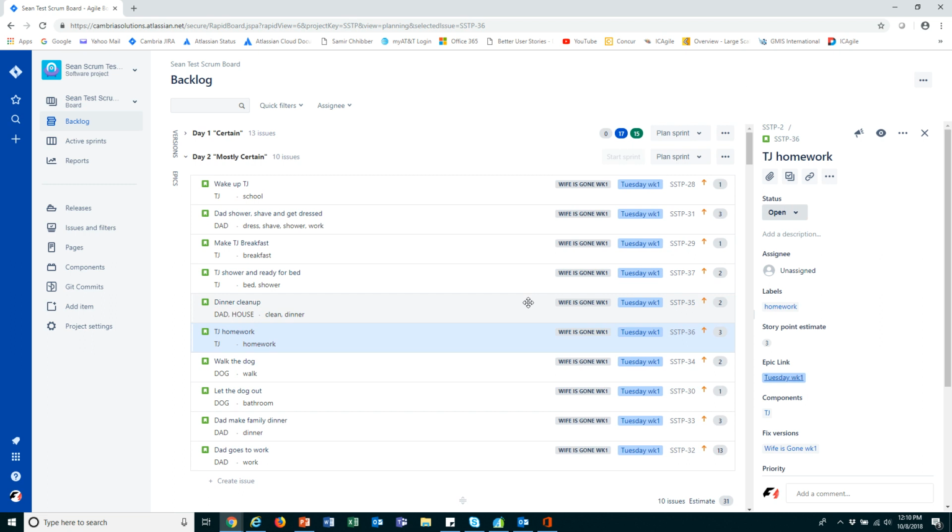So in your planned sprint, make sure that you leave some room for work that rolls over from one sprint to the next. That really should only be a factor on a team that is relatively new and still hasn't matured. Once you do get a mature team, the number of stories that roll over from one sprint to the next should decrease, and it should get down to 0.